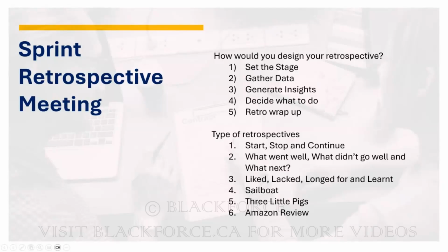Now, the first thing you want to do is set the stage, right? What do you mean by setting the stage? When you're setting the stage, you're making them welcome. You're trying to break the ice. What are the things you do to break the ice? You can decide to go with weather reports. You can decide to do a game. You can decide to tell them to sing. You can decide to tell them to draw, right? There are different resources. You have the Drawer source, you have Sing It Out. There are a lot of resources, right? You can do Kahoot. There are different things you can do, right? But you set the stage, you bring them in the mood.